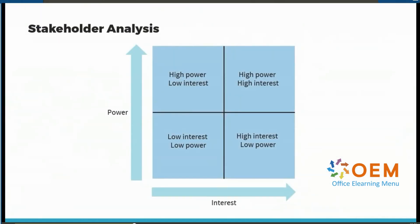Once stakeholders have been identified, the subsequent step involves analyzing them. The Power Interest Grid serves as an effective tool for this purpose. This tool assists in prioritizing stakeholders by categorizing them into four groups: high-power high-interest, high-power low-interest, high-interest low-power, and low-interest low-power. Each group necessitates a distinct engagement strategy. For instance, stakeholders with high power and high interest need to be closely managed and kept well-informed, whereas those with low power and low interest require minimal attention. Employing this approach helps ensure that resources are allocated efficiently and positive relationships are maintained with all stakeholders.